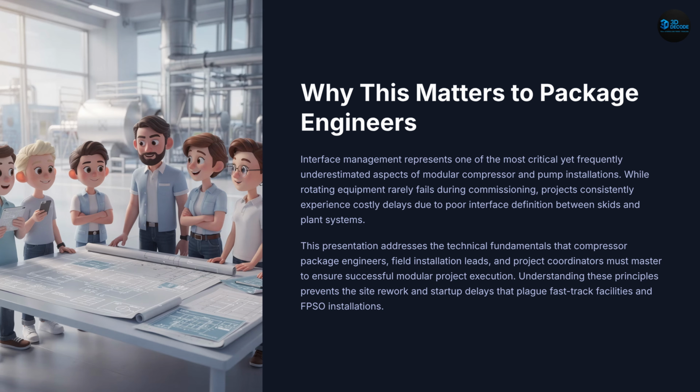Slide 1. Why this matters. In modular projects, rotating equipment rarely fails during commissioning. However, most delays happen due to poor interface definition between skids and plant systems. Interface management is one of the most critical responsibilities of a package engineer. If interfaces are not clearly defined, it leads to rework, delays, and coordination issues across multiple disciplines.